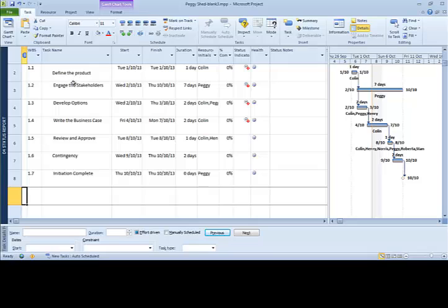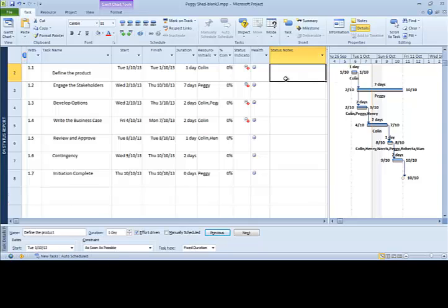We'll have a look at the columns that we've got here. We've got a task name, start, finish, duration, resource initials, which is what we have on everything else, and then a percentage complete. Next to that we have a status indicator, which is calculated from the dates underneath to see whether it's finished or running behind. Then we have a health indicator, where we, as the project manager, can put some values in to indicate how healthy we think the thing is. And then status notes, which we use to capture any information about catching up or issues that we might have identified.